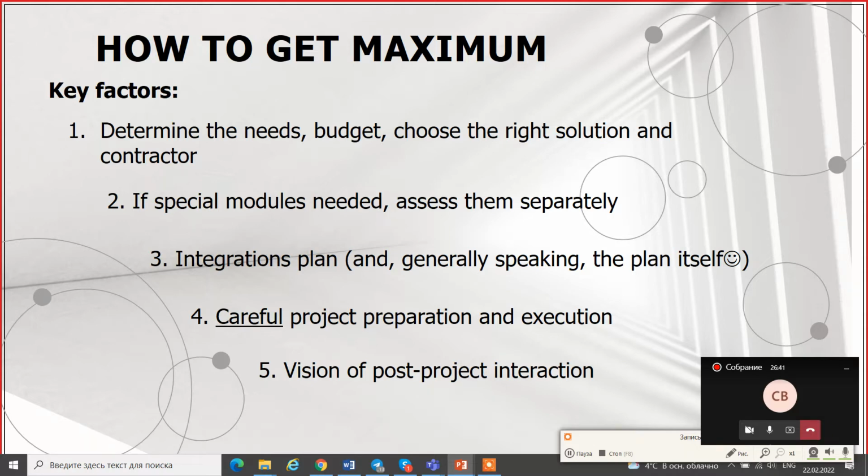because of the implementation of such class of solutions. And in an empirical way, more or less precisely, you can adjust it to your expectations. Or the second scenario, much rarer, is when you have a very detailed, broken down model of the organization, where every part of the business process is determined, estimated, and you can calculate the cost of every branch of the business process. It's a luxury that almost no one can afford, because if you speak about consulting contracts for such work, the guys from Ernst & Young can take from 100,000 euro for this job and up to the stars. Something like 400,000 euro can be not much in their price lists.